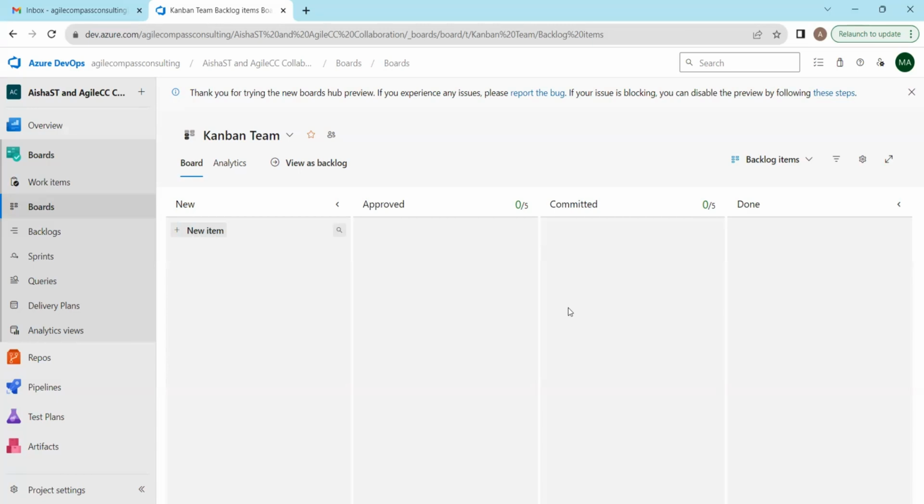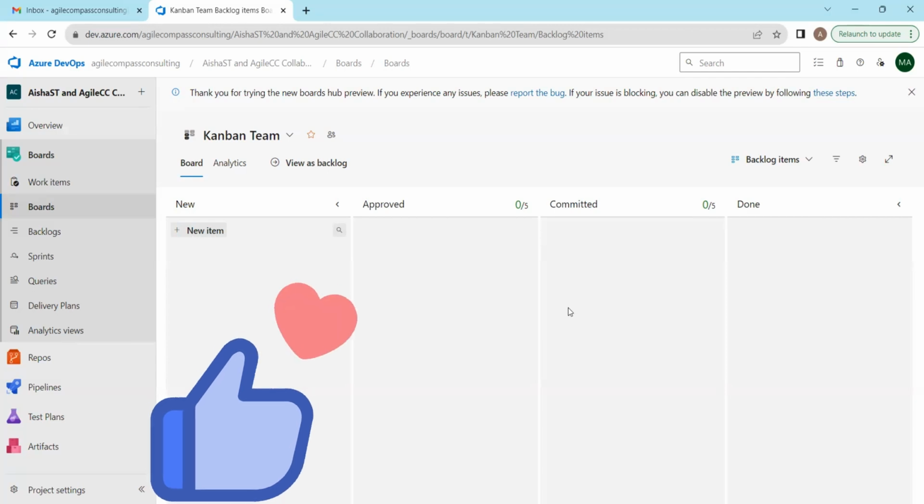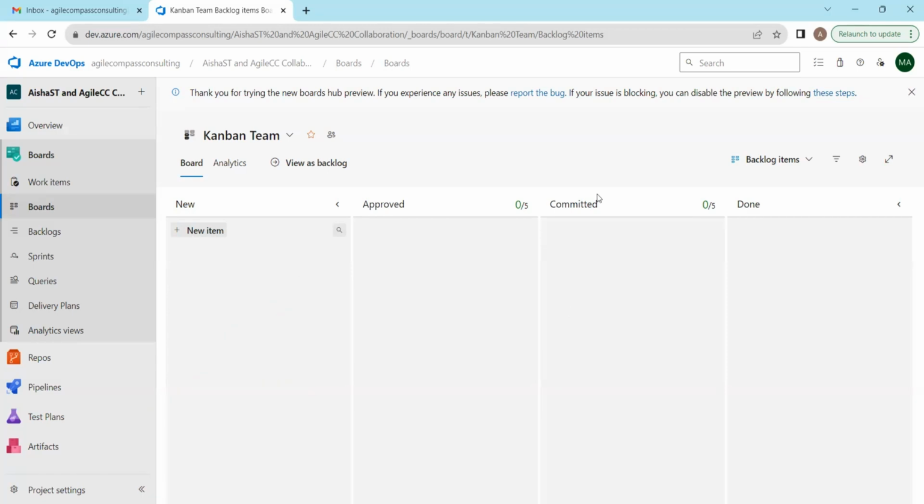So it's for that purpose, so that at every point in time, we are able to tell what is the progress of our ticket. Okay, the second practice in Kanban is setting up WIP limits. Very important. We're going to see how to set that WIP limit up, but I just wanted to mention that right here. So those are the two practices which are very important for you to say you have a Kanban team. You should have these two things. All right. So let's say we want to customize our boards to work for us.